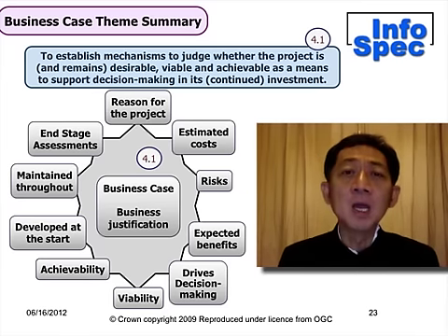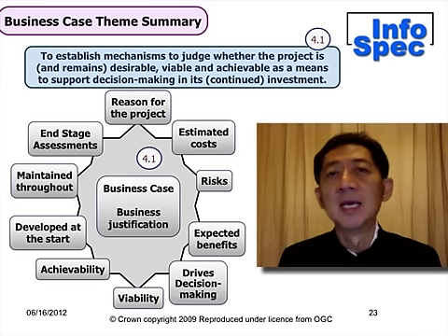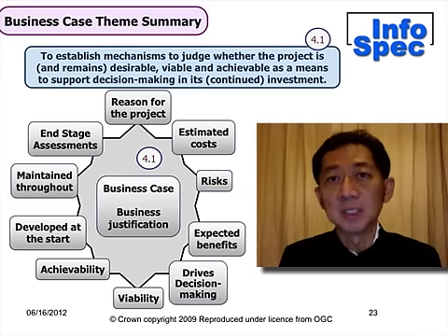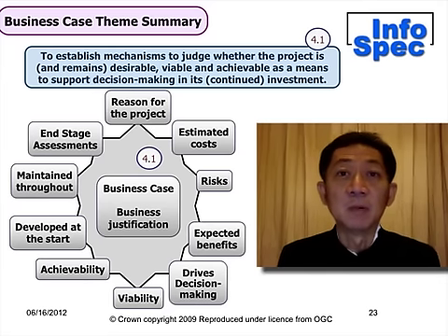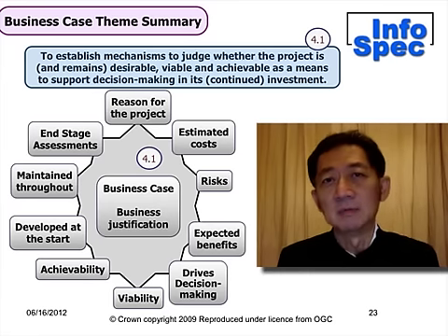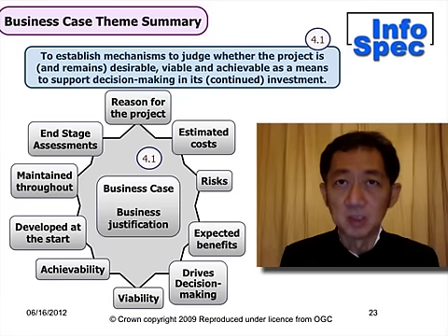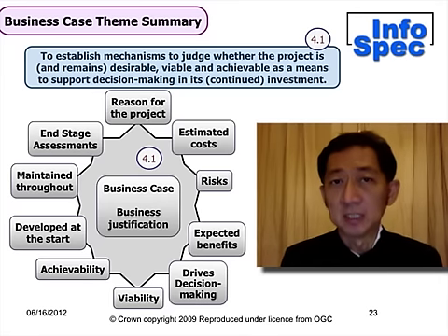Remember, the business case is developed right at the start of the project. It has to be maintained. Any updates to it, any situation that may affect the business case, for better or for worse, has to be considered, documented, and very often approved by the project board as you go through the various stages. And the stage assessments will always consider the business case.